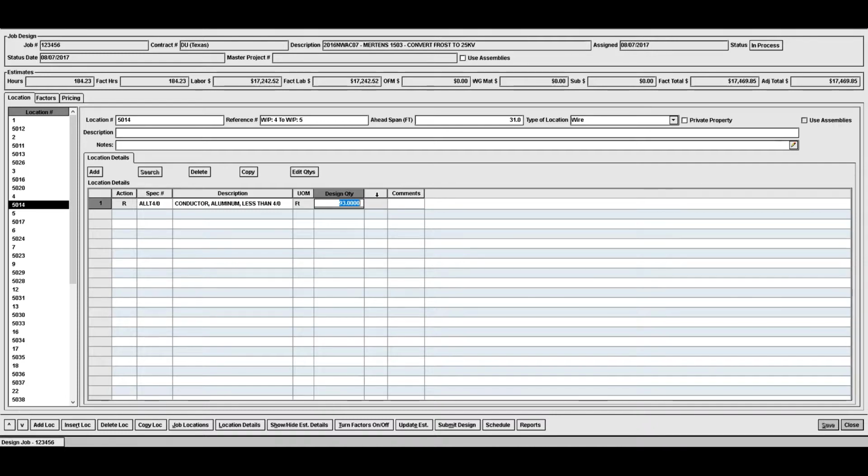If the work group had loaded this data, they would have seen the design quantity and an estimated quantity. On initial load, both the design quantity and the estimated quantity are equal. But for the work group, the design quantity is locked and the estimated quantity initially equals the design quantity. Now, if the work group goes through and makes any modifications to the estimated design quantity, that's going to initiate a change order. If the work group adds any units, the design quantity will come in as 0. The estimated quantity will presumably be non-zero, and again, that will trigger a change order.